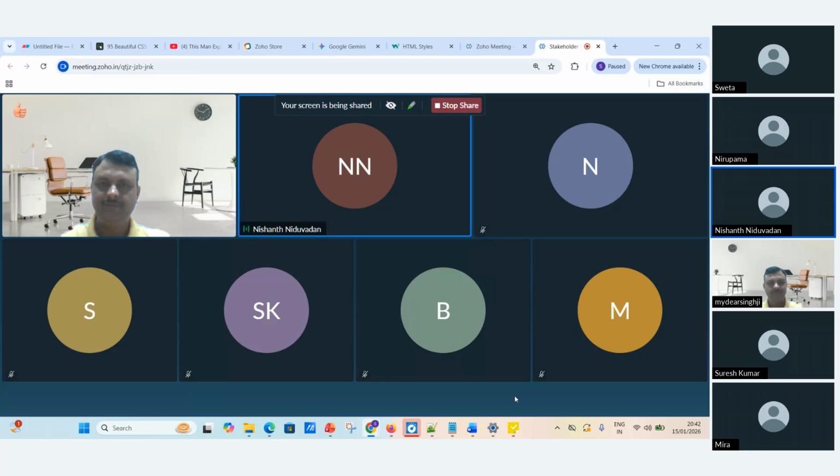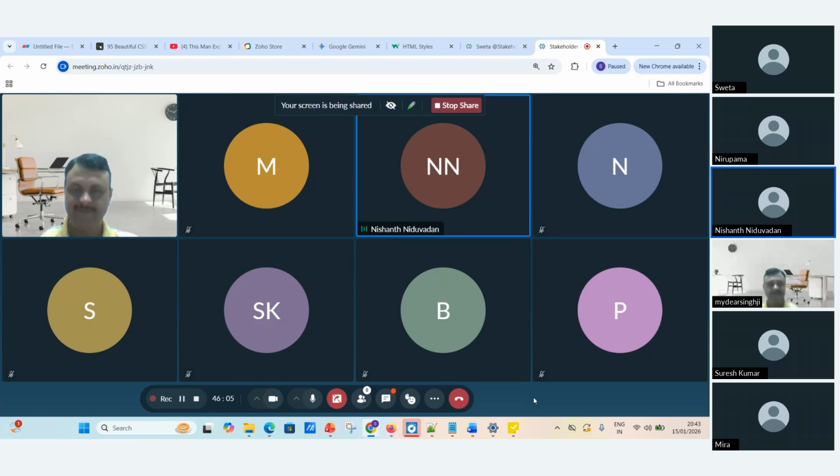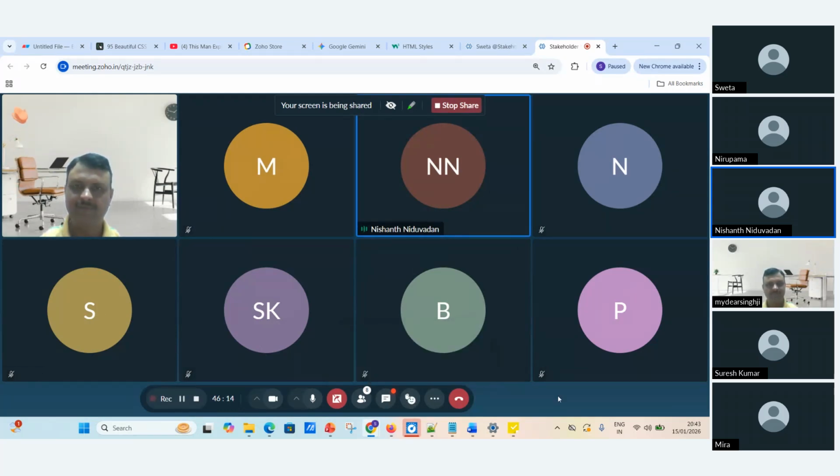When it comes to impact, it is important to cover the cost, the timelines, and the scope of the project, and what type of change this is going to bring, so that it can be discussed with the change control board, necessary approvals are taken, and then it is implemented. The project plan can be updated with the change as well, and most importantly it is communicated, because it is important that every stakeholder is notified about the change taking place in the project.